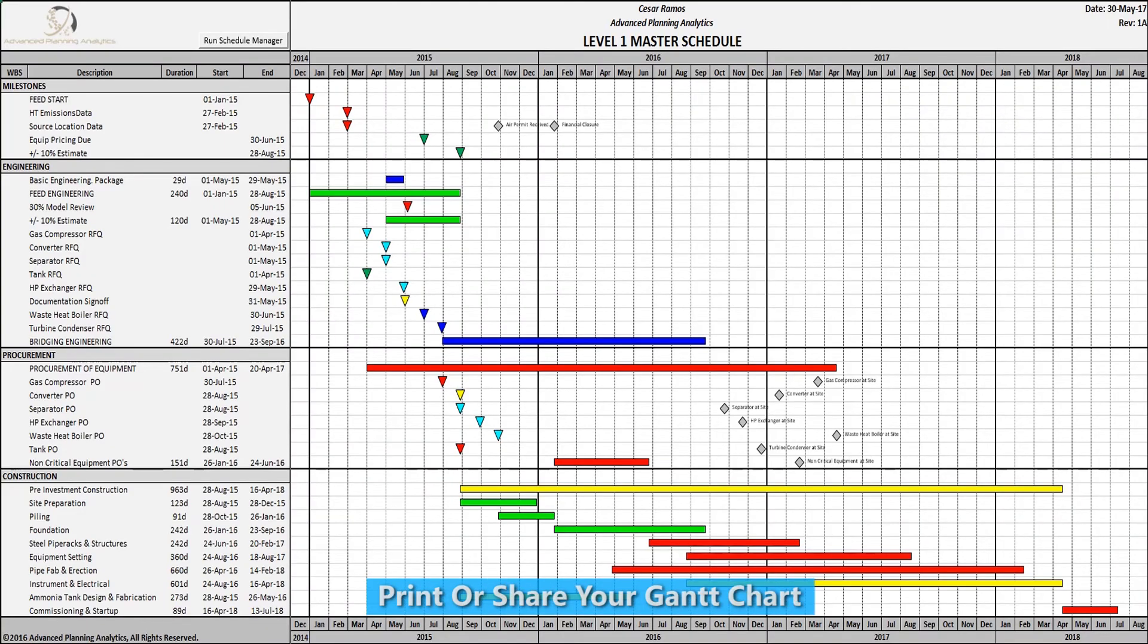Print out or share your Gantt chart. Note that this only emulates a Level 1 schedule. It does not calculate CPM.